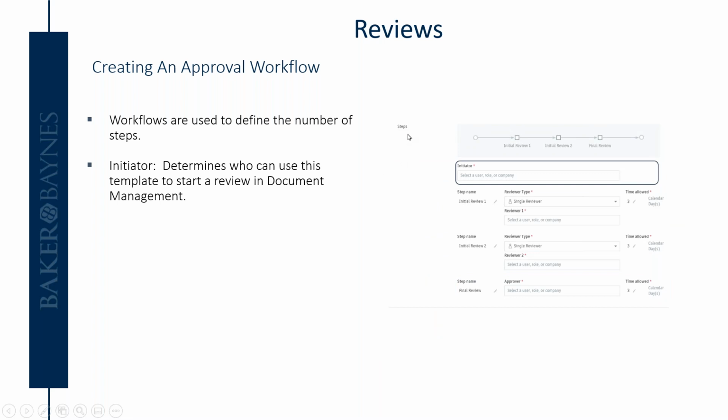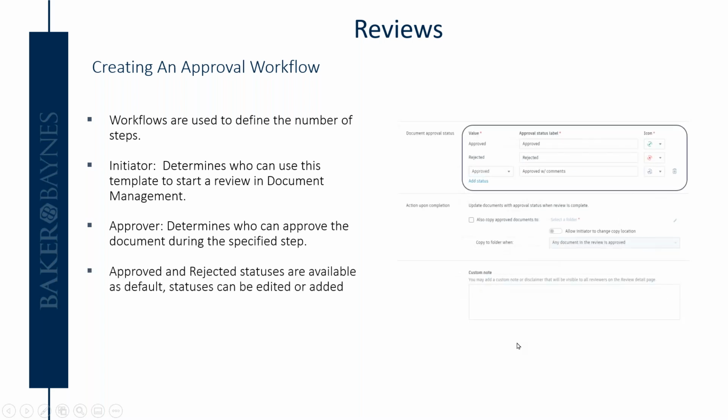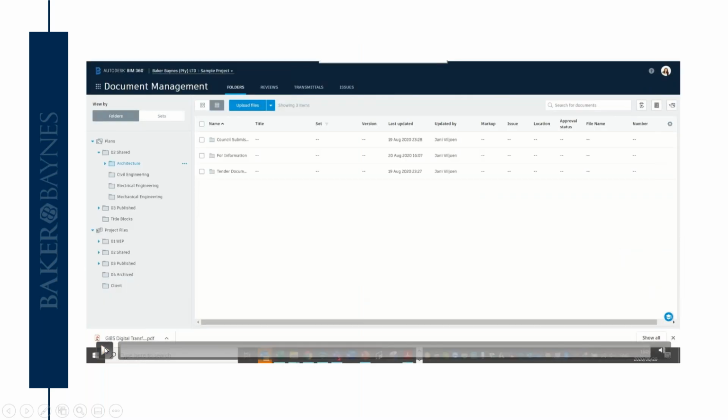So here you can see this is under approval workflows in your project admin environment. You can go and set up a workflow. Firstly, you can set up an initiator. In other words, you can say only Yanni can start this, let's call it a shared to publish approval workflow, or an architect shared to publish approval workflow, or all the architects can do it, or only the BIM manager can do it. Create the person who needs to be the reviewer, and then the person who needs to approve it. Let me show you this in here.